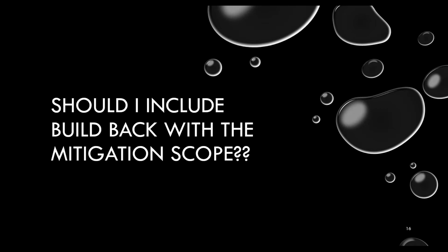Normally, they're interested in doing mitigation, which means stop further damage from occurring, to get the situation under control, and then let's back up and look at it together. You should have a separate contract for mitigation, just as you have a separate contract for rebuild. On rebuild you're more than likely going to get an agreed to scope with everybody involved, that being the person you're working for, and he agrees to the scope of work.